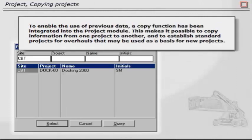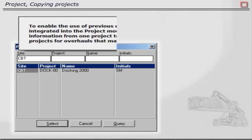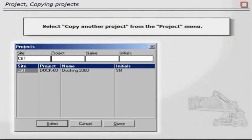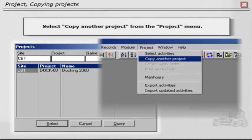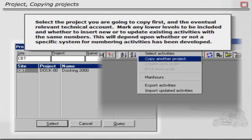To enable the use of previous data, a copy function has been integrated into the Project module. This makes it possible to copy information from one project to another and to establish standard projects for overhauls that may be used as a basis for new projects. Select Copy another project from the Project menu. Select the project you are going to copy first and the eventual relevant technical account. Mark any lower levels to be included and whether to insert new or to update existing activities with the same numbers. This will depend upon whether or not a specific system for numbering activities has been developed.